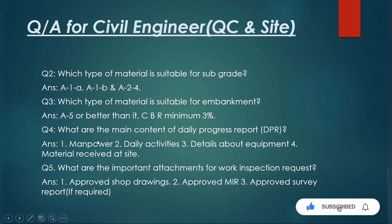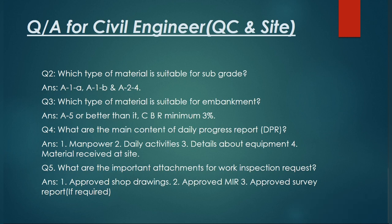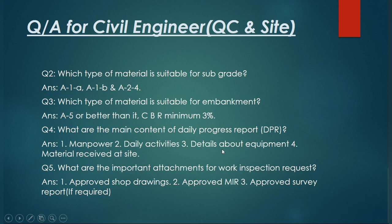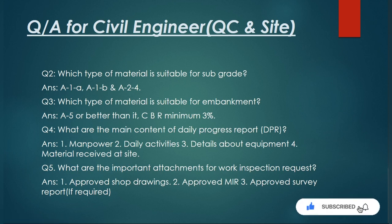Question number four: what are the main contents of a daily progress report? Many interviewers ask this from site engineers. The main contents of the DPR — daily progress report — include details about the manpower present at site, daily activities going on at site, equipment being used at site, materials received at site, and safety matters such as toolbox meetings and safety man-hours.